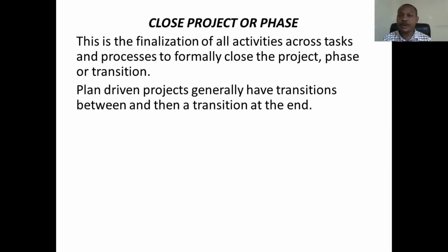So possibly you could say that, okay, now the final users of the project are not satisfied with the project. They're not okay with the project. They're not happy with the project. Meaning you've not obtained customer acceptance of the project. Then you're not done with the project. The project is only done with once your final users have certified the product okay to be used. Then you can boldly say that yes, the project has been done. So that is the closing aspect of the project.